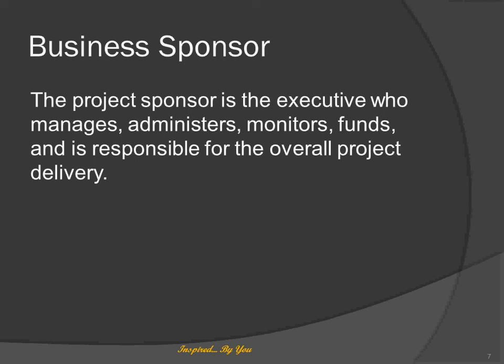They manage the funds. Yes, every project is all about there's money involved. The project has to be delivered, and how much money is needed for a project, there's a proper cycle for that. They conceive the project, they identify how much funds would be needed, then they request the funds from people higher up, from their bosses. When they get the funds, only then they start the project, right? So they keep controlling and managing the project.